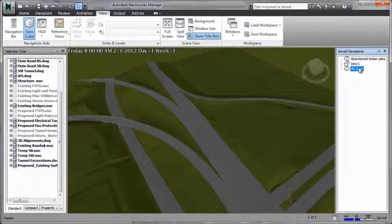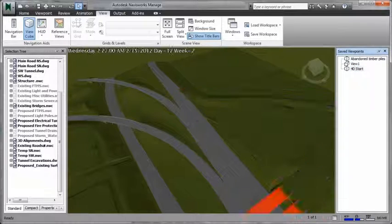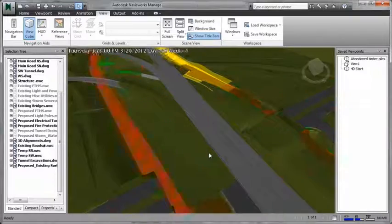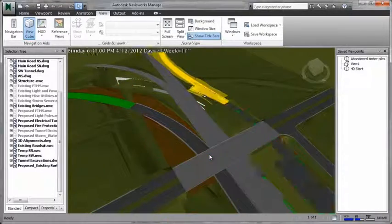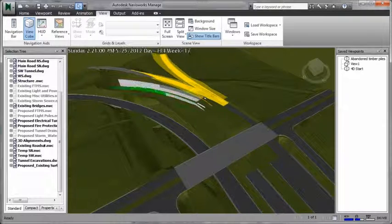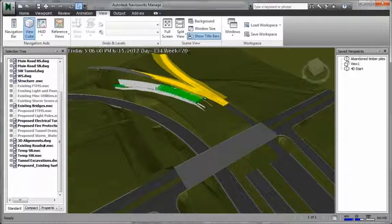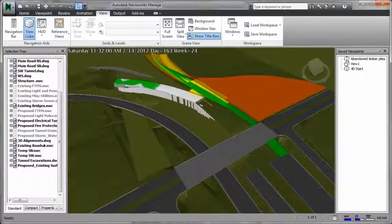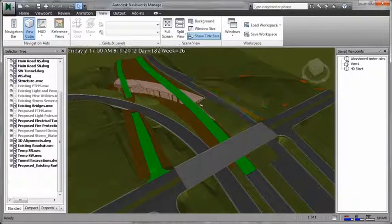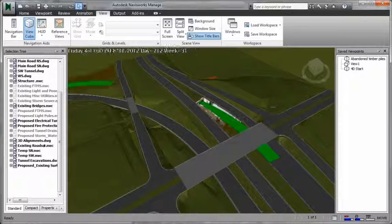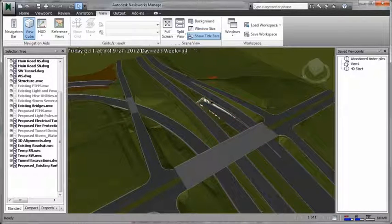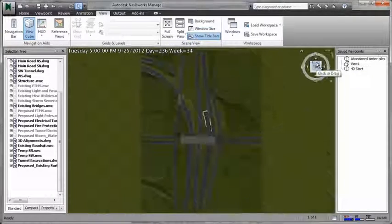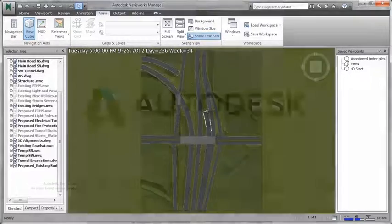When it is time to break ground, enhanced 3D models can be used to sequence construction activities and guide construction equipment. With help from Autodesk Navisworks products, project engineers can visualize 4D sequencing to help improve staging and scheduling and to better direct field teams. This can help speed project completion by reducing idle time for workers, while helping to better predict leasing, maintenance, and fuel cost for construction equipment.